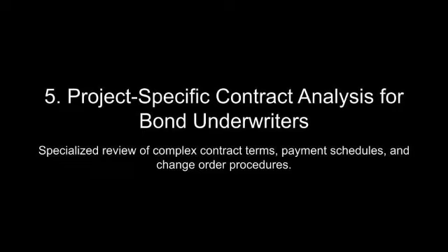When a subcontractor defaults, whether due to financial insolvency, labor disputes, or material shortages, the primary contractor bears the responsibility for mitigating the disruption and completing the work. This often involves engaging replacement subcontractors, negotiating revised schedules, and absorbing additional costs, all of which increase the likelihood of performance bond claims. Moreover, subcontractor defaults can lead to disputes with the project owner, particularly if the default causes delays or compromises the quality of work. These disputes frequently escalate into litigation, further complicating the resolution process and increasing bond exposure.